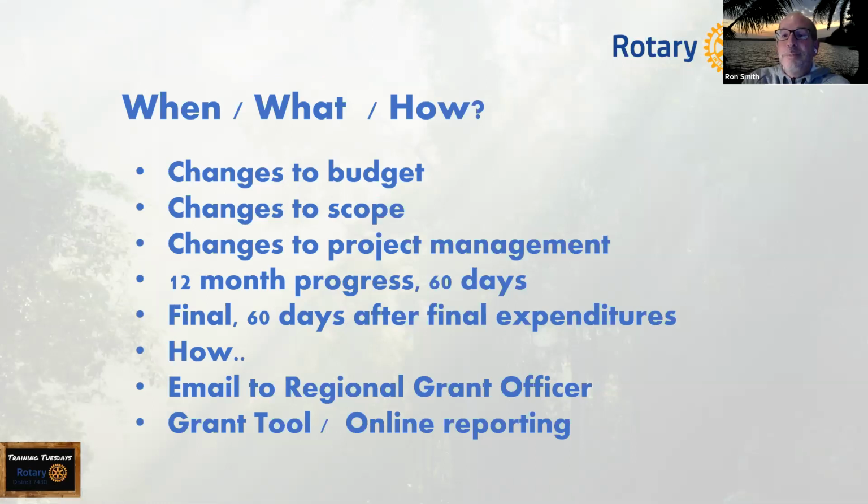Things change. Our project has changed tremendously. Maternal and child health, for example, COVID hit. We had to cancel our VTT back to the U.S. Probably we're not going to have any back here in the term of the project. So now we're reallocating that money. One of the things we did is we asked Rotary Foundation, look, these midwives need to survive COVID. Can we buy PPE equipment? There's $6,000 that we need to buy PPE equipment for the 5 or 6 health centers that we've been working with on our project. Immediately, we got the yes, go ahead and do it.